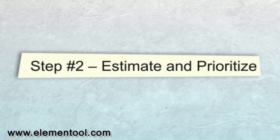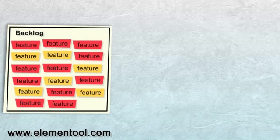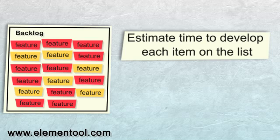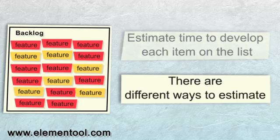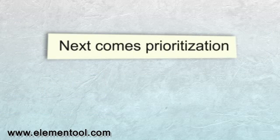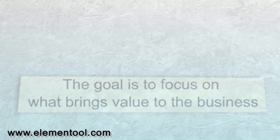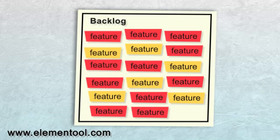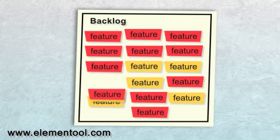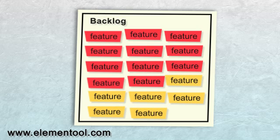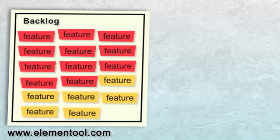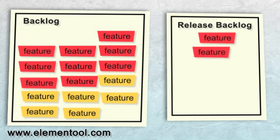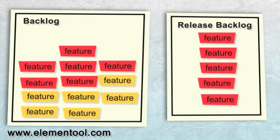Step 2: Estimate and Prioritize. After completing the backlog list, the Product Owner estimates how long it would take to develop each item on the list. There are different ways to estimate, and I'll explain them in another clip. Next comes Prioritization. The goal is to focus on what brings value to the business. The Product Owner sorts the backlog items by priority, from the most important at the top to the least important at the bottom, picks the features that should be included in the release, and creates the release backlog.